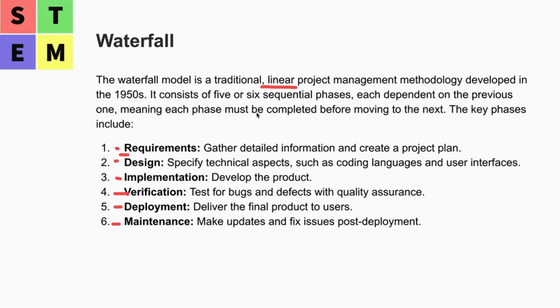Okay, if it meets the requirements, meets the standard, it can go to the next stage, for example, the design stage. If it doesn't meet the standard, then the project team needs to go back to the requirement stage and fulfill the missing piece.